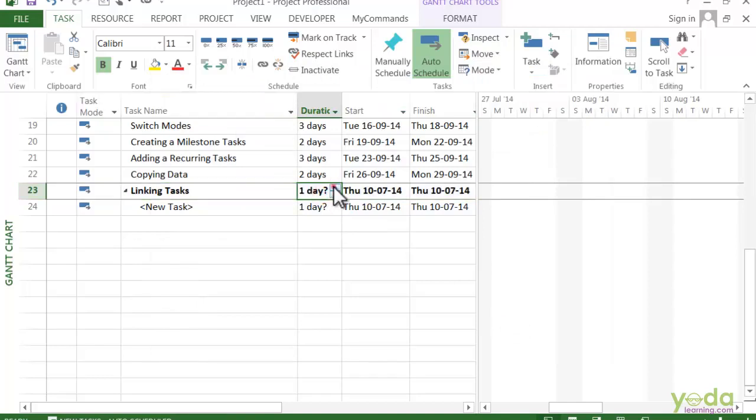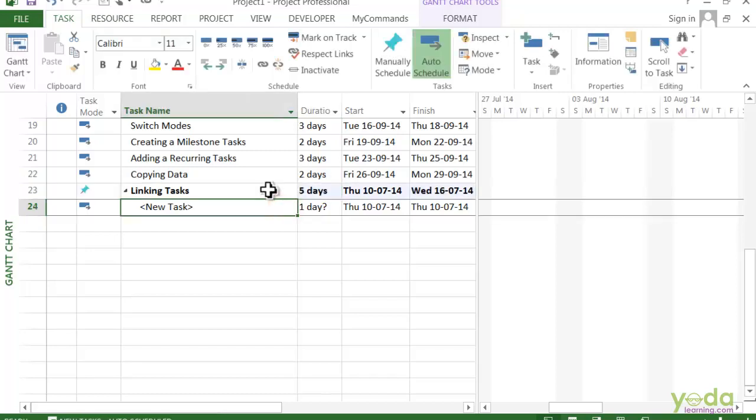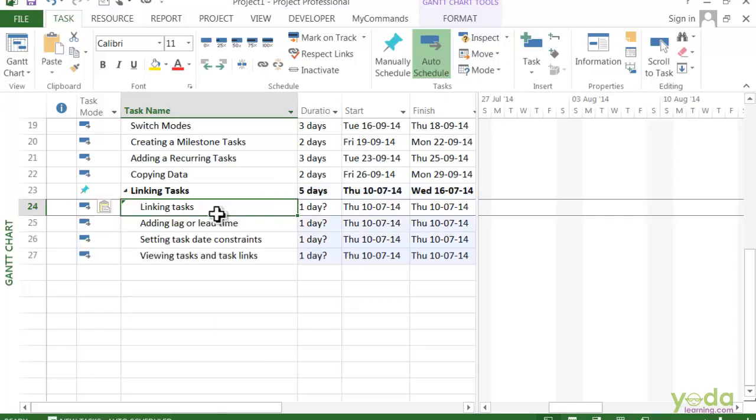I have to give 5 working days for this summary task, and would like to add these four topics as the subtasks for the Linking Tasks. I can just keep doing that to add as many subtasks as I need for this new summary task.